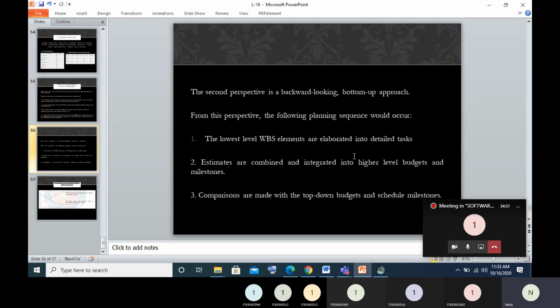So these two approaches are what you have to remember for this part. The scheduling of milestones and the allocation of budget through top down estimation tends to exaggerate the project management and usually results in an overly optimistic plan. Bottom up estimates usually exaggerate the performer who is performing the activities, and usually result in an overly pessimistic plan. Both plans have their uses, pros and cons, so we have to find the differences between both, proceed accordingly, and finally develop the complete project.